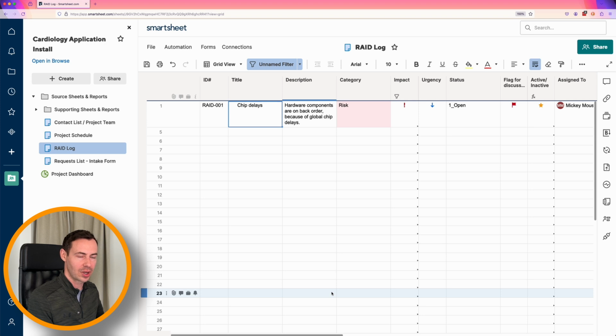Let's say in addition to that, anytime we get past the initiation phase of a project, if we're into planning or certainly into execution, there should be minimal assumptions that are still assumptions at that stage in the game. Said differently, if you have an assumption, let's make sure that early in that project effort, we're looking to minimize those and change as many as we can from an assumption into an actual decision. So let's take a look at a filtered view of what the assumptions look like so we can take some action on those.